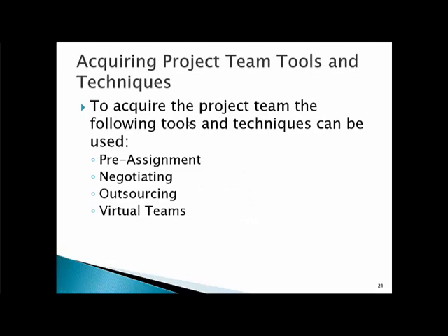To acquire the project team, the following tools and techniques can be used. Pre-assignment, which is selecting project team members in advance. Negotiation skills with the functional manager or other project management teams to be able to share scarce resources or get the resources that I need.